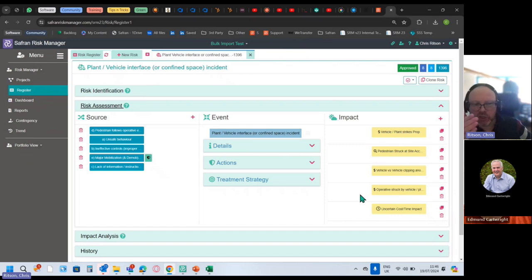There's an overhead that is stretched for a longer period of time that wasn't supposed to be there, whereas a direct cost might be we need extra bricks as those bricks have gone missing, someone stole them, so there's an extra direct cost. So there might be different ways of articulating different types or categories of impact and being very precise about it. And then, as you can see with the action icon, you can then map particular actions with different owners to different pieces.